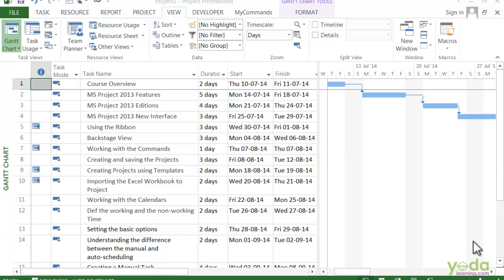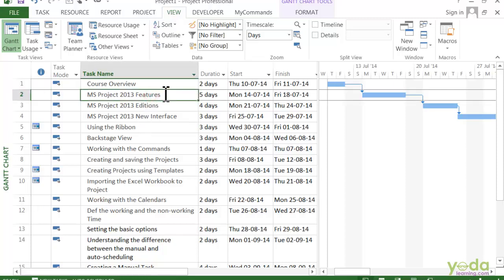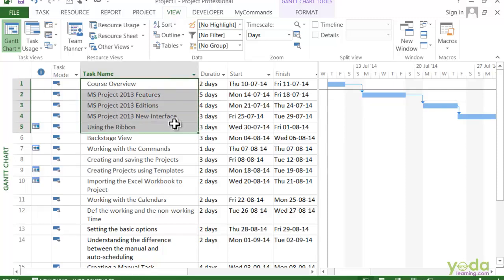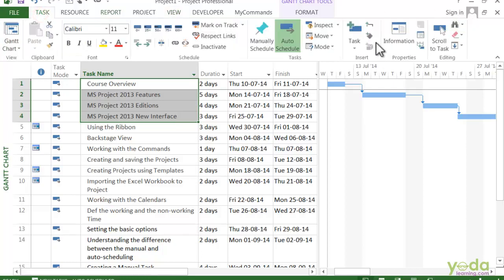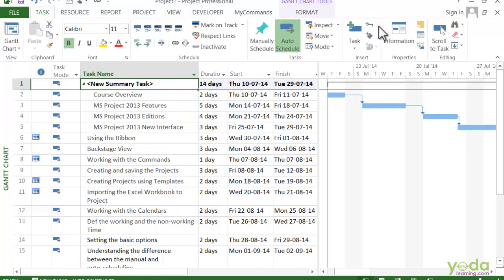Like these four cells, and then on the Task tab, in the Insert section, click on Summary. You can see the project adds a new summary task.